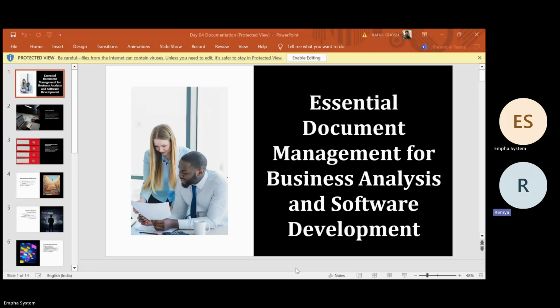So one more thing when you're explaining this, Rahul: when you say that somebody is supposed to put in a document that this is what happened, this is why we are closing this add patient feature, how will you locate which developer did this and why? See, whenever they are doing this, the process is they should mention the ticket number, or at least some reference. Based on that, we can refer to that particular thing. Maybe they can refer to some URL, maybe some meeting discussions, date or something like that.